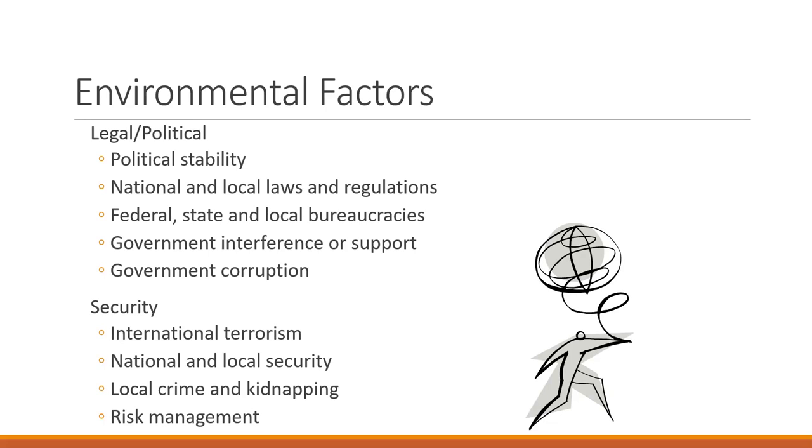If you were taking on a project in areas that are near or within countries that have a lot of issues with war and violence, there could even be project risk management to your actual project when you're having to navigate that. There's high theft in the country, so you could have materials stolen all the time. There's a possibility of your location being vandalized or even bombed, depending on what location that you're in. So things that you have to consider.